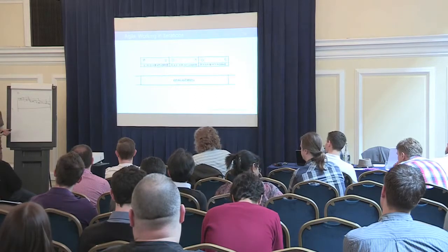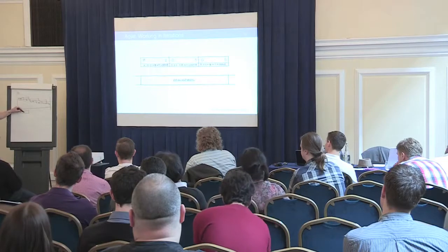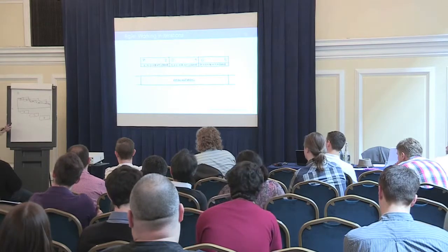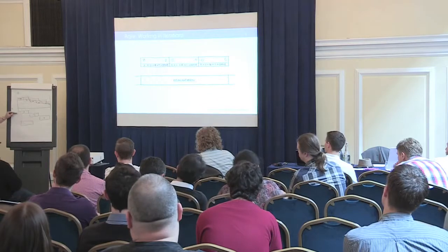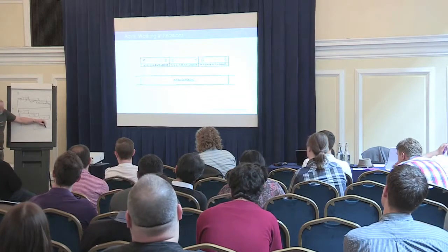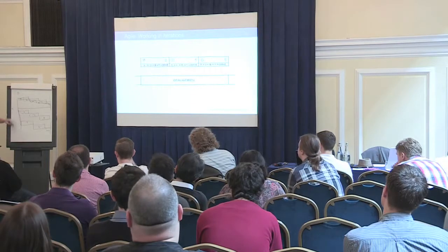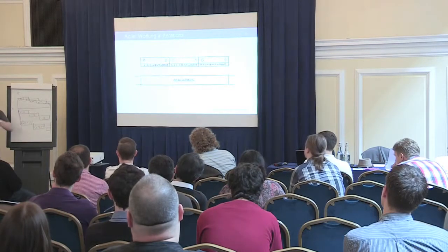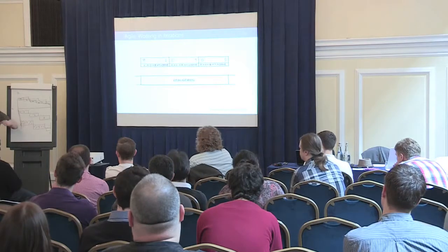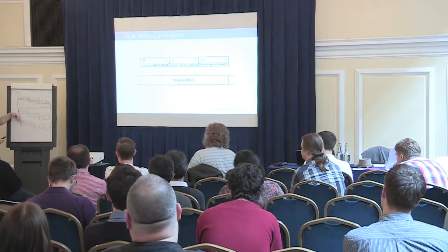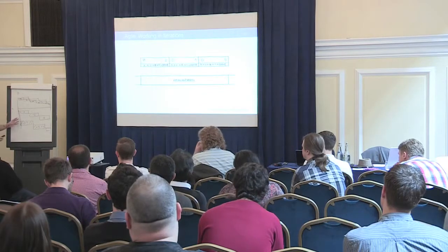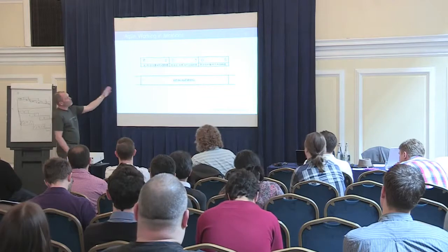So what you should actually do is do the work items one by one. So this is work item 1, then work item 2, and then work item 3. If I now run into trouble, and it takes me more time to do the individual work items, let's say this is work item 1 and 2 and 3, and then my time's up, that means I at least have delivered work items 1 and 2, right? So I have progressed. So you do it on a work item basis, and that's slowly when you move beyond Scrum, because if you do it work item by work item, you are slowly moving into slightly more Kanban-like projects, right? And we've experimented with that for years and years, and to us that works a bit better.